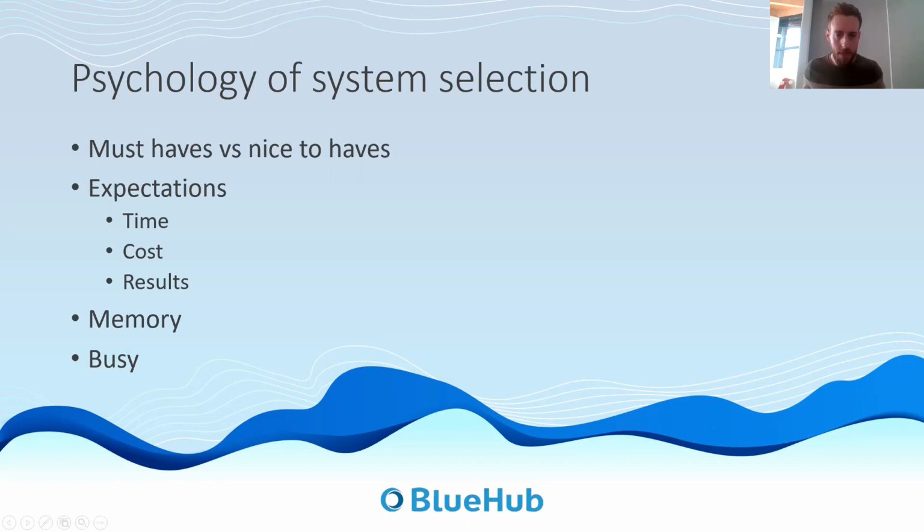And then the other side is, you'll get this with a lot of owner-directed businesses, they're impatient. I literally spoke to someone this very morning who wants their system to go live tomorrow. Luckily they're a startup, and likely this is something we can facilitate, but in general, if this was an established business, they're going to need a few months. So again, setting those time expectations is just as important as setting the cost expectations.